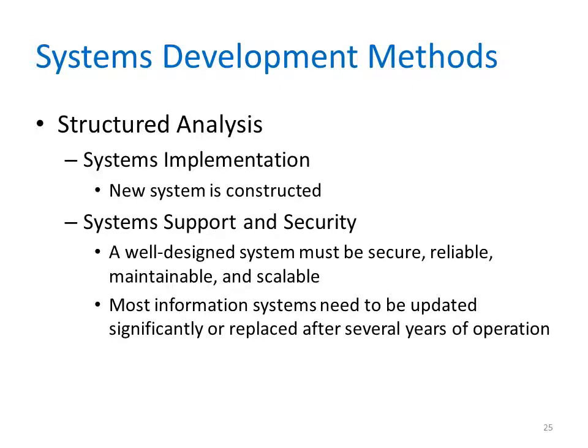During the systems implementation phase, we'll actually build the new system. The objective of the systems implementation phase is to deliver a completely functioning, well-documented information system. At the conclusion of the implementation phase, the system is actually ready for use. Final preparations, which we'll talk more about later, include converting data into the new system's files, training the users, and performing the actual transition or cutover from the old to the new system.